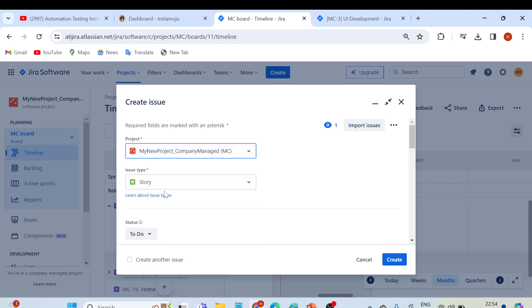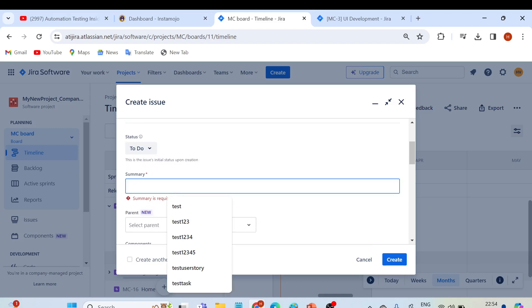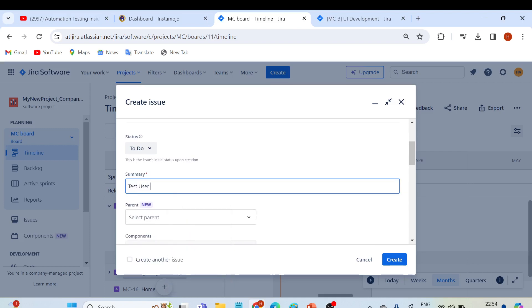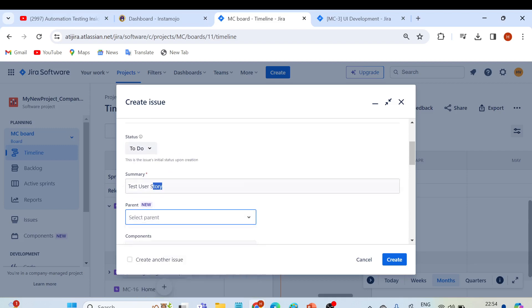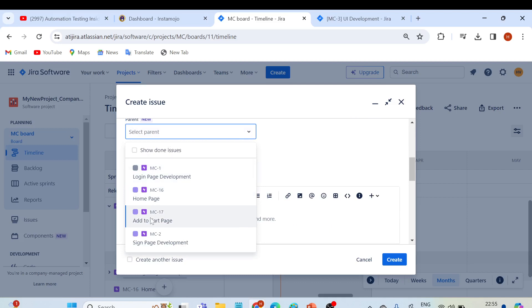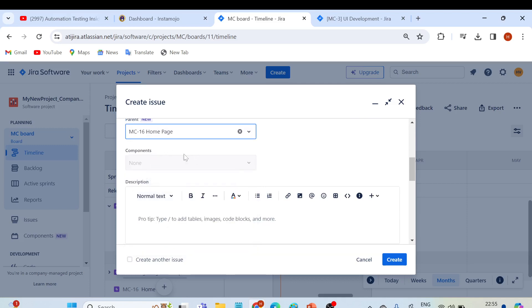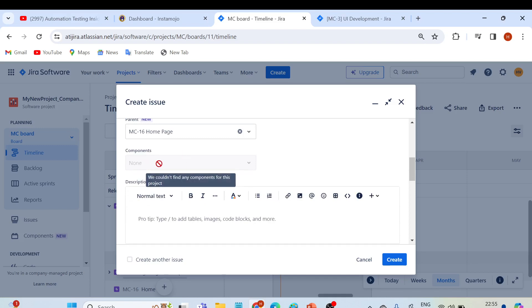By default, the project 'MC' and issue type 'Story' are already selected. The status workflow currently has three statuses — let it be 'To Do' when we start this user story. I'll give it the summary 'Home Page User Story'. For the parent, you can link it here so this user story will act as a child of an epic. I'll select the 'Home Page' epic since we don't have any user stories inside it yet. You can also simply enter the summary 'Home Page User Story'.